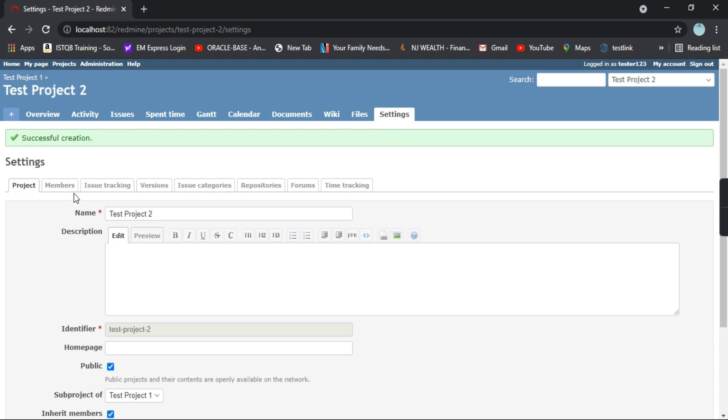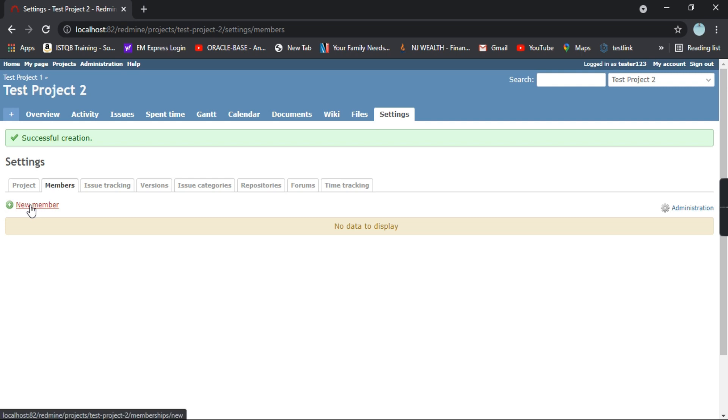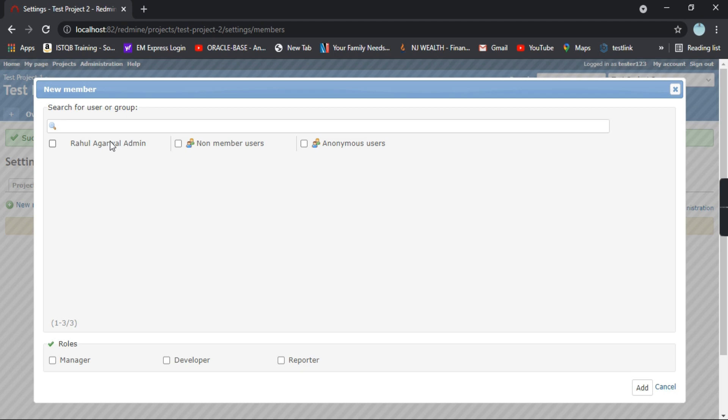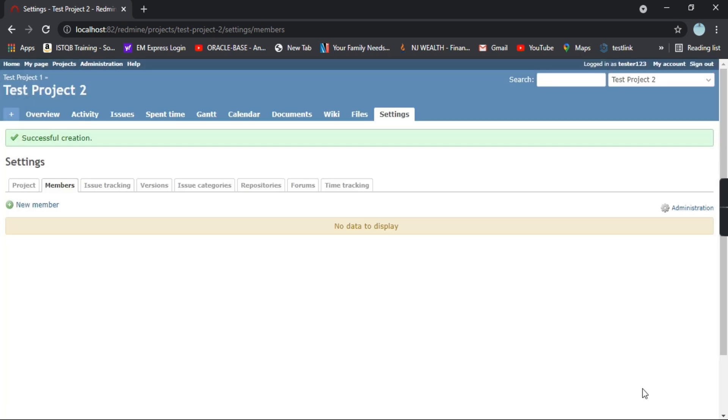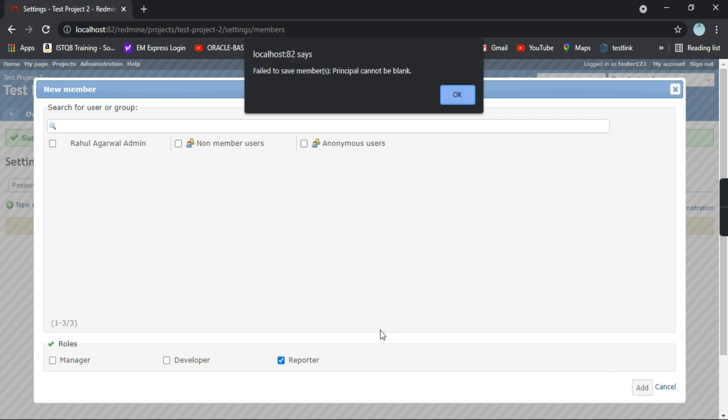Coming to one by one options, these are the members. We don't have any members as of now. You can click and add a new member out here. We don't have any members except the administrator. So you can just click on add. You have to select the role, so a manager, developer, or a reporter. I'll select the role as a reporter and I will click on add.